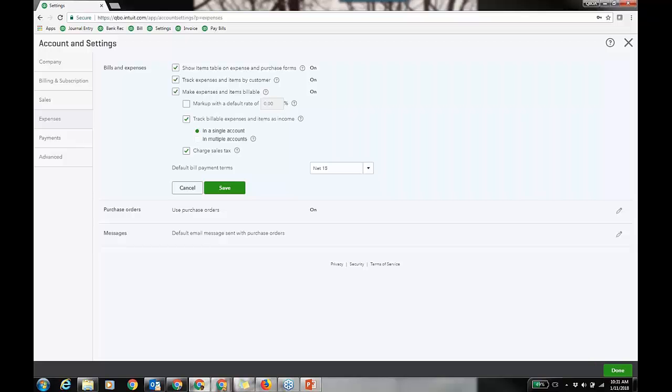Because on the bill, check, and credit card expense that I have in QBO Plus, because I checked off this box, there's an item details section, not just account, but items. And I know my estimate that I'm starting with, and we'll go over a setting for that in a sec, is item-based. And so are the other sales forms. So I really need to use items and have the item detail on these cost forms. So I can check off this box. I want to tag it to a customer just for profitability by. Or if I'm passing it through, making it billable. This, you want to check off this box as well.